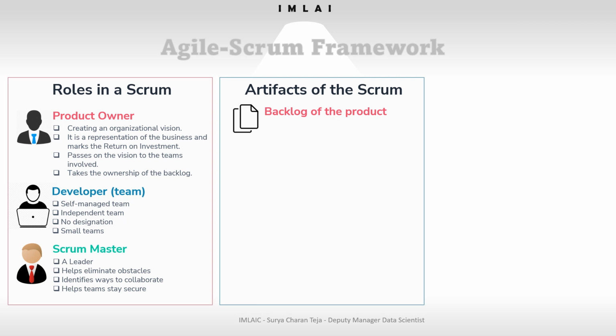So working software always measures this progress. Documentation in Scrum is only through four main artifacts, namely product backlog, or call it the backlog of the product that we have just discussed. I have told you that we will discuss later. The documentation in Scrum is only through four main artifacts that I told you. That's the product backlog is the first one, and then sprint backlog, and increment and definition of done. These are the four important artifacts that we find in Scrum.